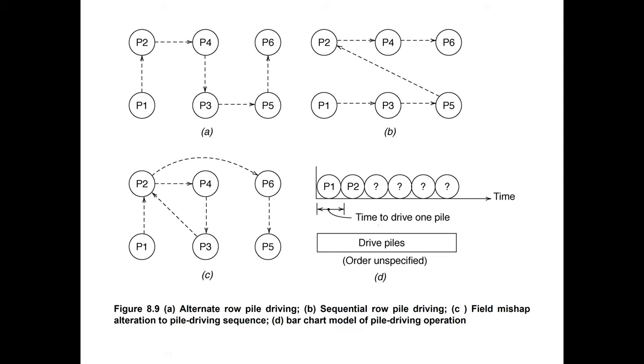So for the person who is going to work in scheduling on Primavera or Microsoft Project, if he is clear that generally it takes this much time to complete piling work for one pier, he can combine all those and find the time for the whole pile driving work. Also, maybe they are driven piles, like concrete piles, or spun piles, or bore piling work. Whatever the work will be, depending upon that, how much time is required to complete the piling work under each pier. So they can find the total time for the piling work. So this is how we make the scheduling logic.